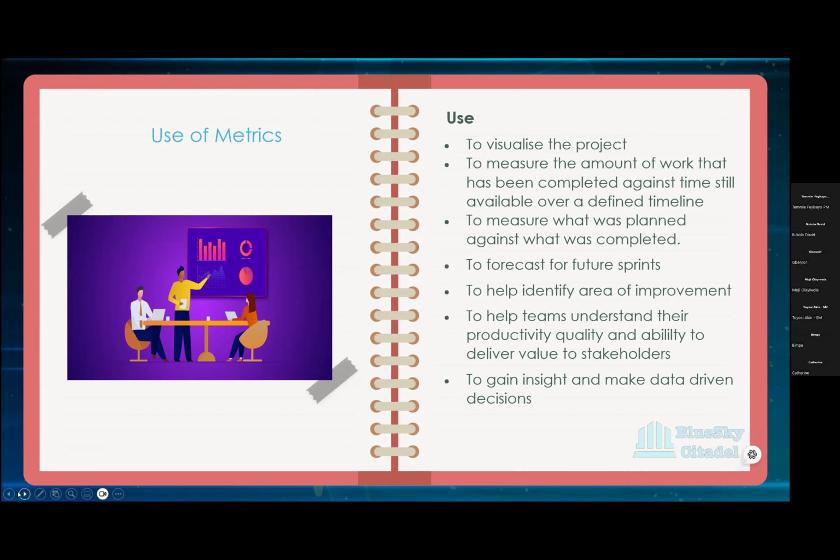So in a situation where you're waiting on reviews, you want somebody to help you review your code before you move it on. The testers didn't get the stories on time, and so they're closing it late. All those things are what your chart will tell you. All those things are the things you want to work on.